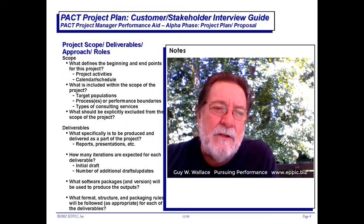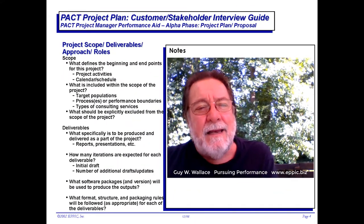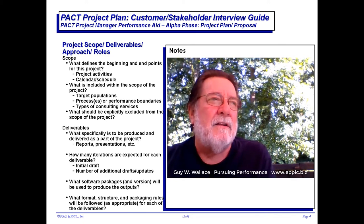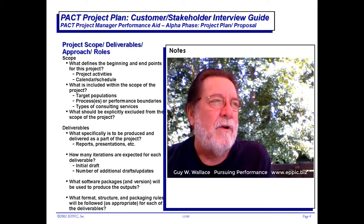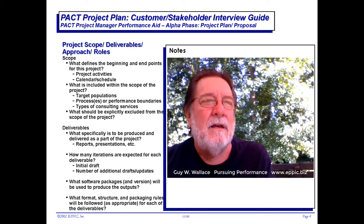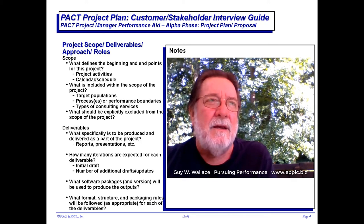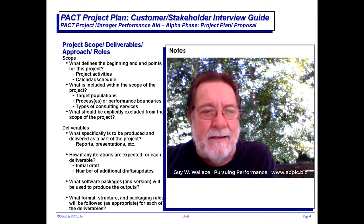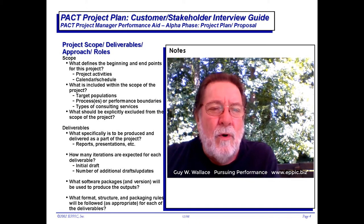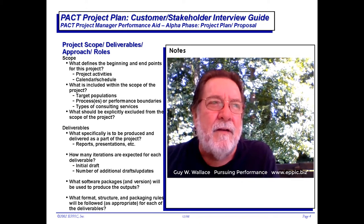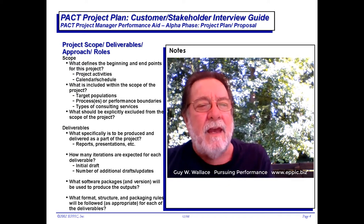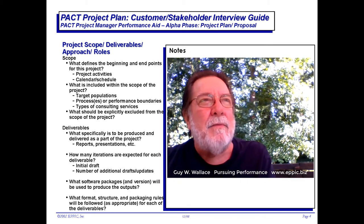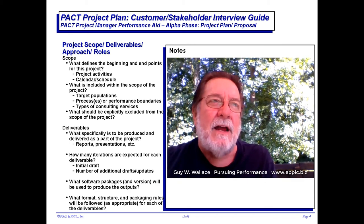Page four: we want to understand what defines the beginning and end points for this project. Are we going to create something and hand it off, or are we going to be involved in continual delivery? Or will this be put in the cloud for people to access whenever they want — or is that controlled access? What's included in scope? We're figuring out what's inside the box of the effort as they see it, what might be borderline, and what's definitely outside the box.